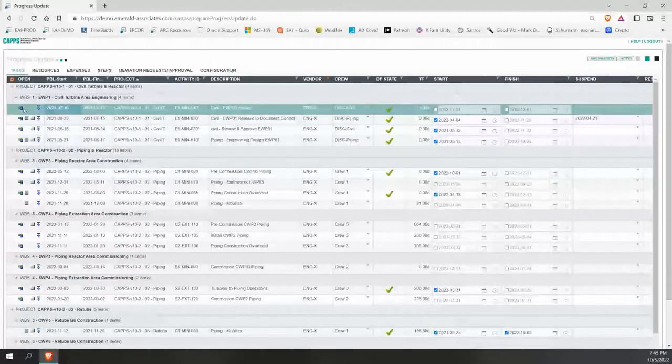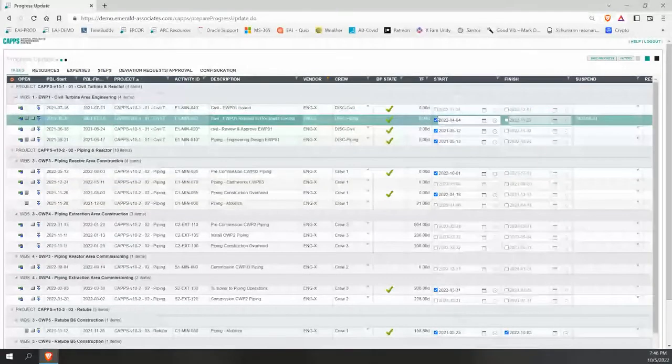this particular activity, it has activity only. There's no expenses, no steps. There's resources only, plus the activity, which we're on, but it doesn't have expenses or steps. So the second example might be a better one for us to try. Okay, and that's our engineering work package release to document control. Okay, so I started this activity a little while ago. It's not finished yet. I can see it's got a float of 0, so it would be critical.